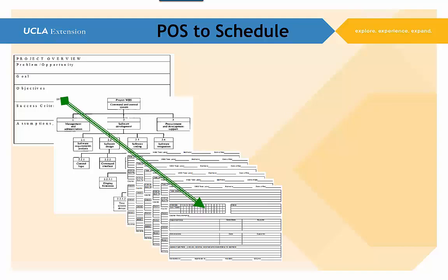And then we also want to add one other very, very critical bit of information, and that is, what is the basis of estimate for this task? What are we basing our estimate on? This is the support, the substantiation, the corroboration that gives us credibility in our estimate. Is this like a task we had last year, only it's twice as hard or 3 times as hard? What was the project we did 2 months ago, and we had a task just like this, and it was just about the same as this, so we've used that.